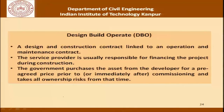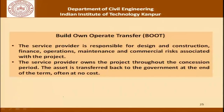Two other variations: DBO — design, build and operate — links a design-and-construction contract to an operation-and-maintenance contract. The service provider is responsible for financing during construction, and the government purchases the asset from the developer for a pre-agreed price prior to or immediately after commissioning, taking all ownership risks from that time. In BOOT — build, own, operate and transfer — the service provider is responsible for design, construction, finance, operations, maintenance, and commercial risks. The provider owns the project throughout the concession period, and the asset is transferred back to the government at the end of the term, often at no cost. I will leave the other PPP forms for you to explore through homework and further reading.